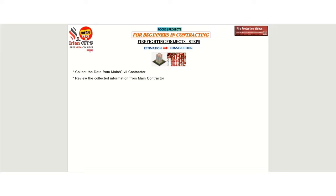The second step is to review the firefighting design specifications and BOQ, and then start preparing the RFQs for all the materials required for the project.